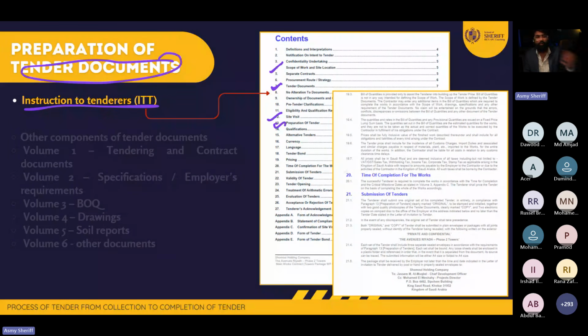For example, in my current project, we are doing one of the regional largest private projects. So in that, we are doing many tenders. For that, what we did, we said you need to prepare all your tender within so and so date, and send the document to us with the address of ABCXYZ. We mentioned the people to whom you need to send because it is confidential information, right? So I don't want them to send a document that can be reached or approached by all the people, where they say, oh, this contractor submitted 2 million, that contractor 7 million. The word of mouth will spread.